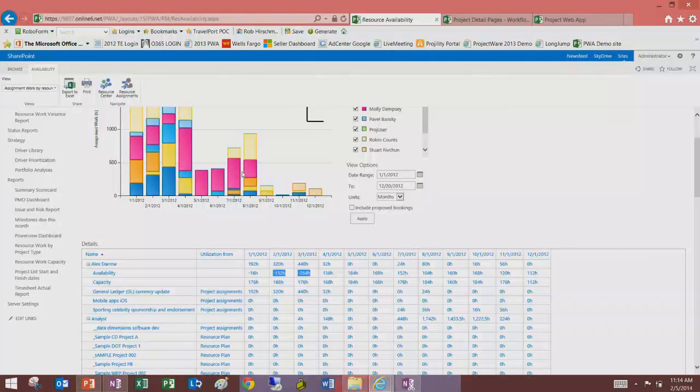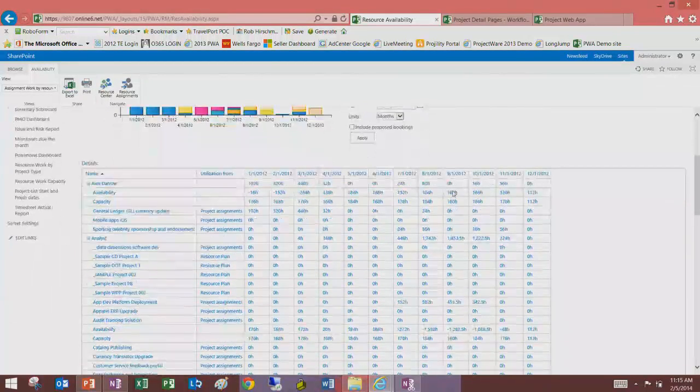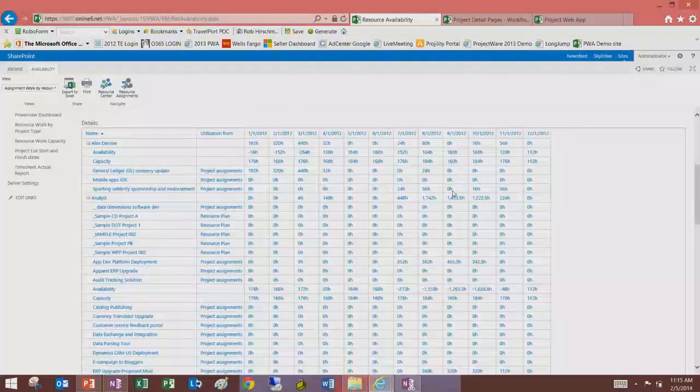The resource plan owns or committed? The resource plan is separate. The resource plan sits above the project, really. So there's a couple of questions about that booking type setting at the resource level. We have that concept both in the resource plan and at the project level, and you can flip back and forth depending on whether your request has been approved or not. Good point. By default, the resource capacity view here does not have that option selected. Well, theoretically, all those bars represent assignments that have been approved.